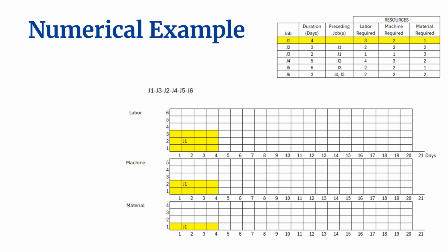This synchronized allocation ensures that J1 has all necessary resources available continuously throughout its execution, satisfying both the non-preemption assumption and the multi-resource constraint. This forms the foundation upon which all subsequent jobs in the sequence will be scheduled.